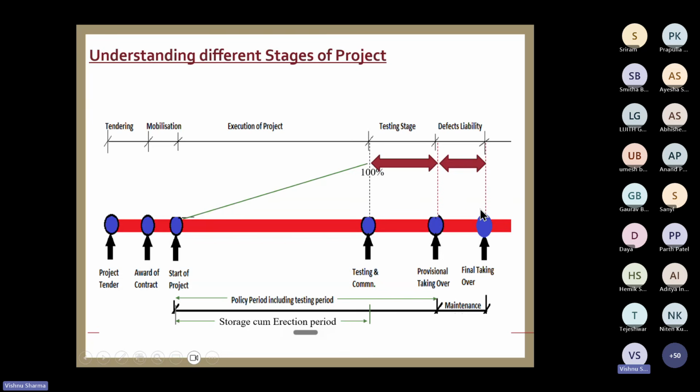That is a part of EAR, but it has got a limited coverage because now the plant has started commercial production after this point. So during this stage, if there is a loss, suppose there is a breakdown loss or there is an explosion, your maintenance period extension will not cover these things. These are operational losses. So what we are supposed to do, the moment your maintenance period starts, we are supposed to inform the contractor as well as the principal. Now from this stage onwards, your EAR policy will not entertain any such claim. They will not admit liability.